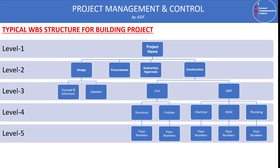Under authority approvals we have municipality approval and NOCs from utility providers. Construction depends on whether there are different buildings — each building can be further divided into civil and MEP. Civil can be divided into structure and finishing work, and MEP into electrical, HVAC, plumbing and drainage. Structure, finishing, and MEP trades can be further divided into floor numbers, and those into activity types such as columns, wall slabs, wet trades, painting, wall/floor/ceiling/external finishing, and MEP first, second, and final fix phases.